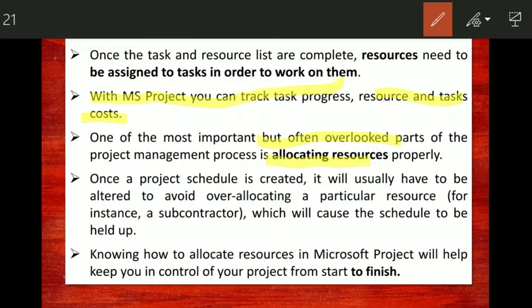So once it is labor over allocation, you can resolve that over allocation automatically and with some other methods also, but there your duration will change. There are 3 options. One, your time will change, your duration will change, and if your duration changes, the project completion time will change. So one of the important things which should not be neglected is what? At the time of allocating your resources, if it leads to over allocation, then it goes wrong.